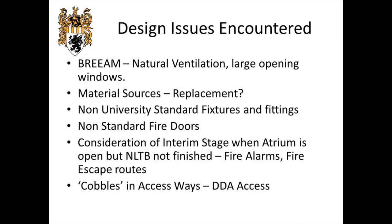It's achieving a balance: we want BREEAM Excellent and we've also got safe window opening. Natural ventilation is what safety people prefer, so we agree with that side. But for the design team to get there it's a big team effort on exactly what we will accept. Part of that is also who is actually in the university and who's going to be exposed to these windows. Most people here wouldn't throw themselves out of a window, but if you're a three-year-old in the library bored while mum's looking at books, you're going to try to open the windows and climb up. So these are the aspects we have to build into advice on how to control issues raised by the design.